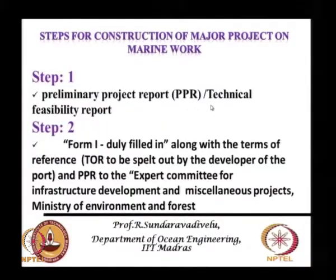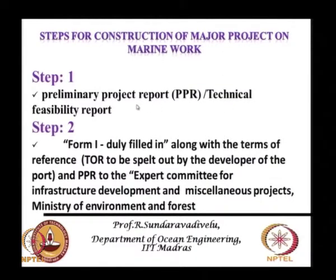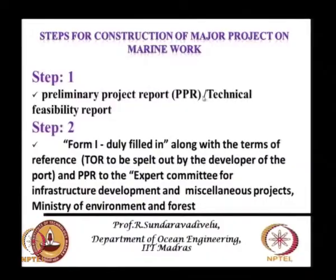Seaport includes shipyards and other facilities also. The first step is to prepare a preliminary project report, that is also sometimes called a technical feasibility report. The developer needs a techno-economical feasibility report. These reports are prepared based on secondary data — meaning whatever data is already available — and general guidelines for cost estimates and other things. Typically this should be prepared within a month's time.